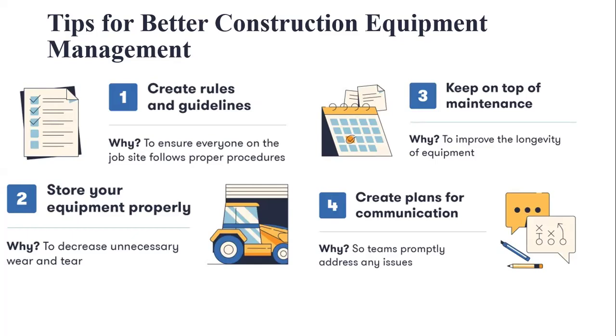Okay. And next, second is storage of equipment. Say, for example, if you're doing concreting this afternoon using a mixer drum, and you plan to do another set of concreting tomorrow, and you allow the machine to stand in the open sky, and unfortunately there is sudden rain, then the rainwater will enter inside the machine and damage the motor and some electrical wires, which leads to additional cost for the project. So you have to spend money to rent a machine for the next set of activities. It will delay the construction time, as well as increase the cost of construction. That also has to be avoided.